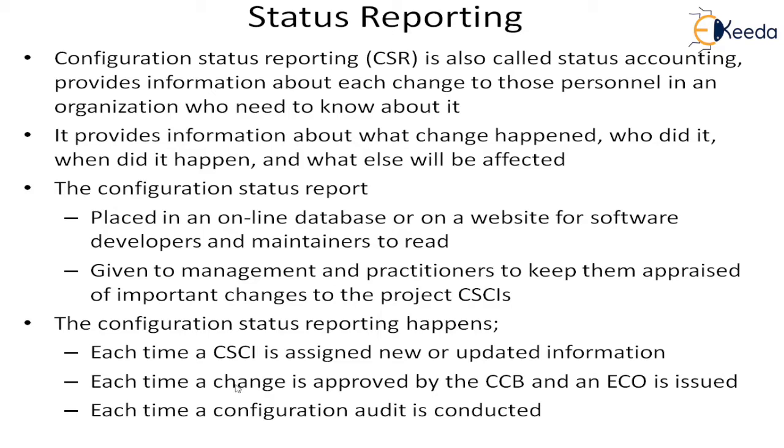And each time a configuration audit is conducted. So this is when it is assigned new, that means a configuration item is added, and each time the CCB approves a change and the ECO is issued, then we have to find out which are the components which are getting affected by this change.